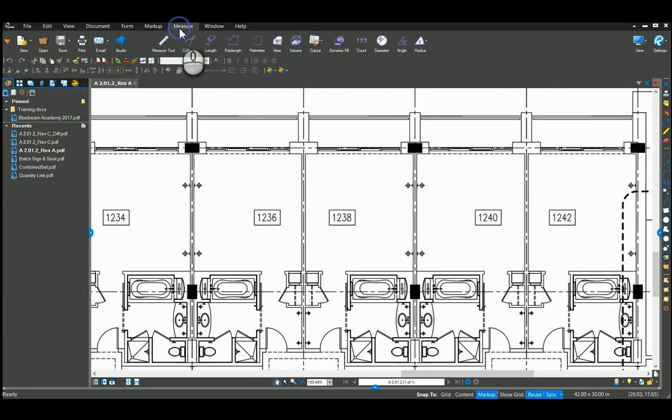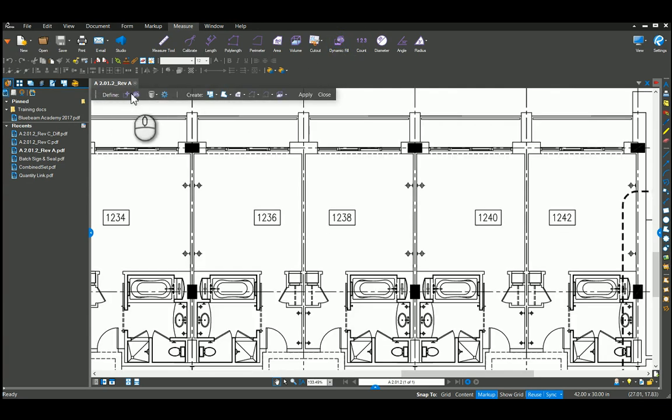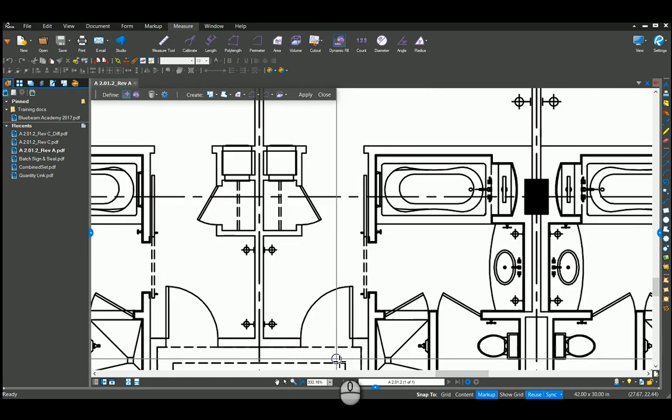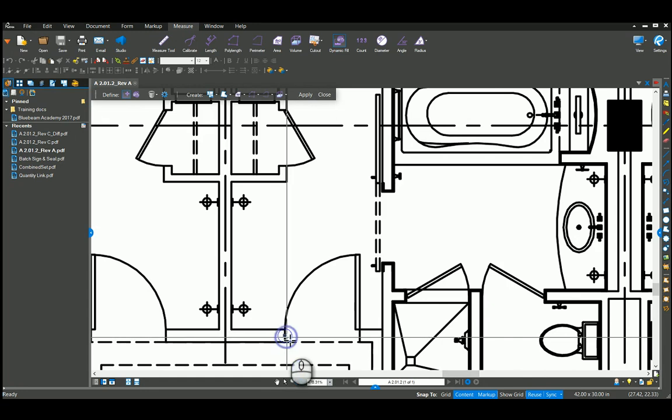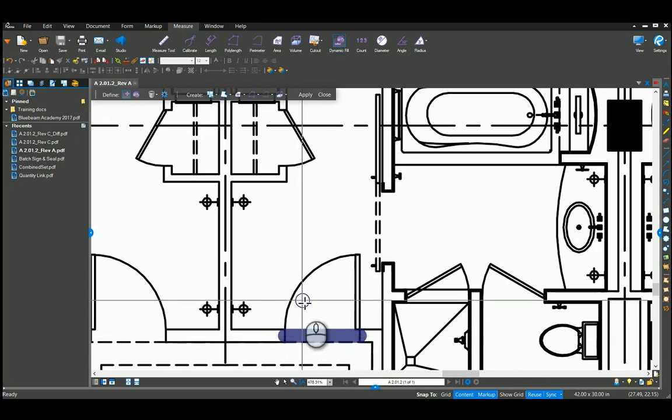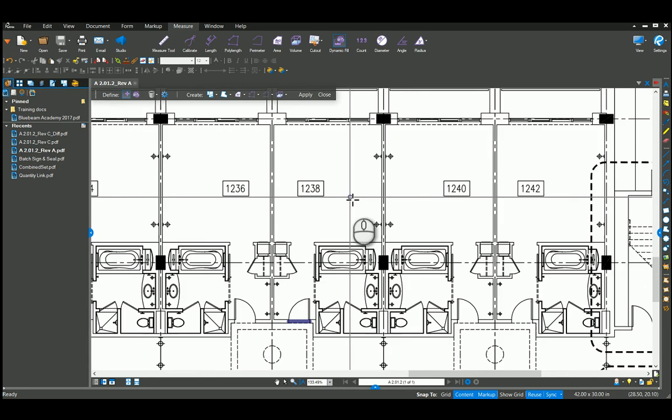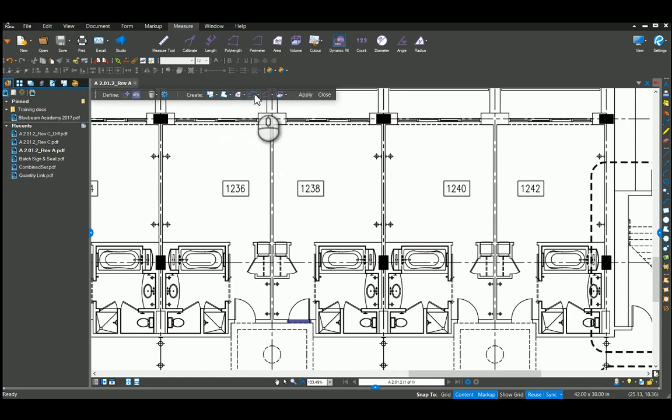If I go to my measure tab and click on dynamic fill up here, I get this new tool box down here that opens up for my dynamic fill specifically. The first thing I want to do is add a boundary. I'm just going to come in here and close these doors. I need to turn on my snap to content. It allows me to snap to these lines, my door. I drew a line across that door to close it off.